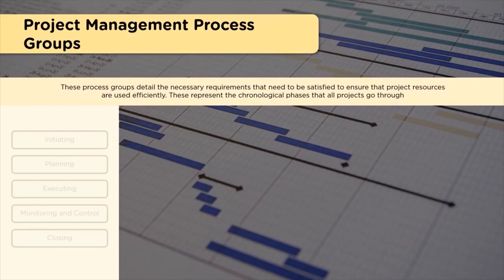As the execution happens, validation checks happen in monitoring and control, and as you find some deviation in monitoring and control, for correction of the deviation it comes back to execution, or if any necessary changes need to be done in planning also while doing these corrections, then it may move to plan, then execution, and then monitoring and control. So this loop continues until the confirmation, yes, it is delivered as per the plan, and then it moves to closure. So that's how the project flows, and the project life cycle would be like that.